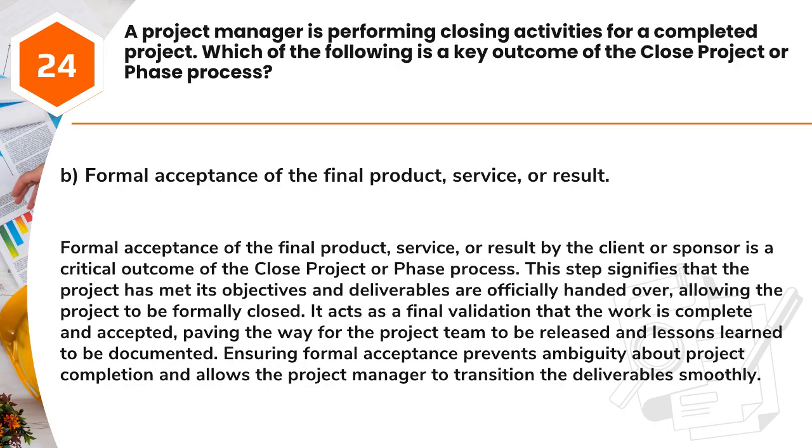Answer: B. Formal acceptance of the final product, service, or result. Formal acceptance of the final product, service, or result by the client or sponsor is a critical outcome of the close project or phase process.